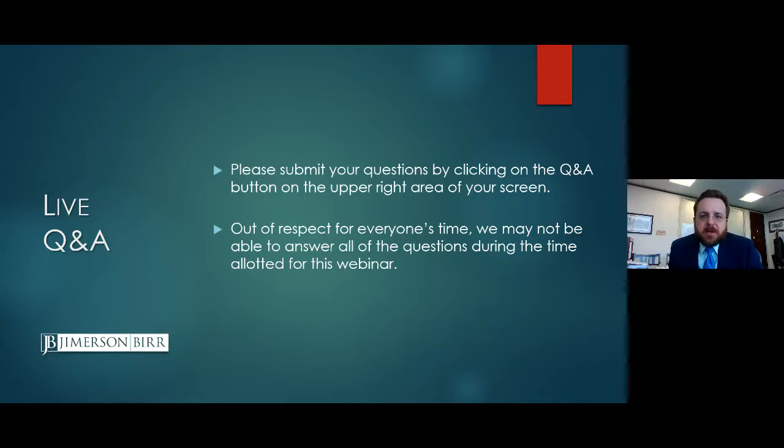But you can also go outside of the contract terms and look at who the owner is. Do you know the owner? Do you know the general contractor? Do you know the product type? The type of building or project? Do you know the geographic region? Do you know the other subs? If you know all of these folks and you've worked with them and you're comfortable, then maybe your risk is more manageable.